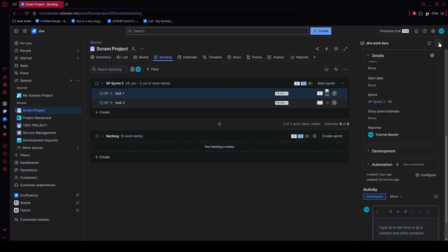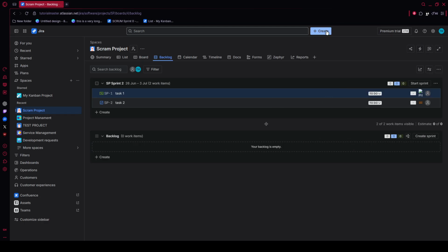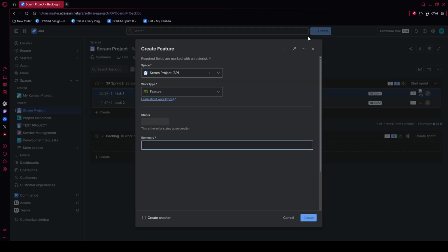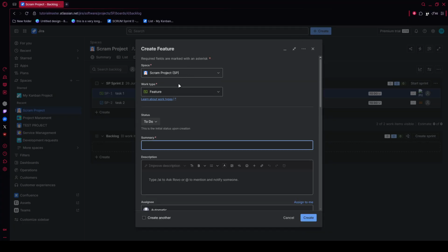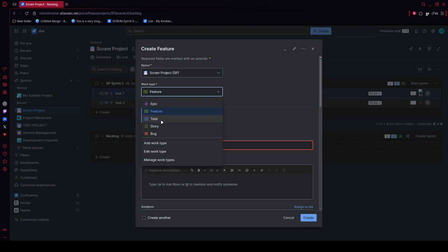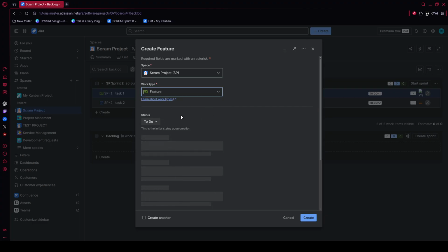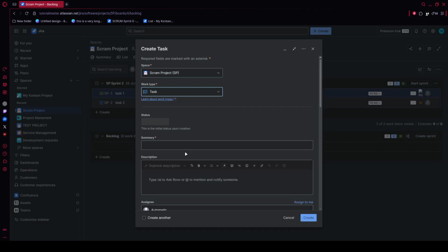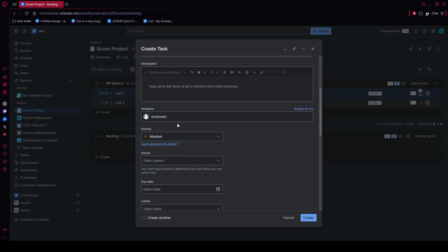After the discussion, turn your most important action notes into trackable work. Select a feedback note, click the option to create a Jira issue, confirm the correct project, and choose task as the issue type. Then assign it to the appropriate teammate and set a clear target. This step is important because retrospectives only create value when improvements are owned and followed through.